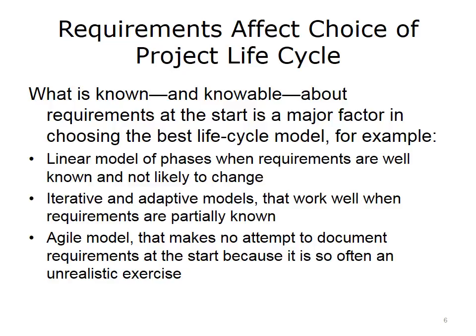In linear, also called sequential, lifecycle models, you can proceed stage by stage or phase by phase. That may be fine for when requirements are known and understood and are highly stable at the beginning of the project. Some other projects may need one of the more flexible models, such as the iterative or adaptive models. You have a strong influence in your role as a project manager in identifying which project lifecycle model to use.